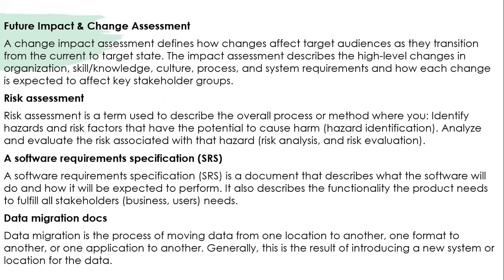These are very important because the company is not ending, it is continuing. So there will be a need to bring in especially balance sheet balances into the system and migrate other master data information. These documents would detail what master data is required for migration, all the requirements that are needed, and all the data that the business will need to provide.